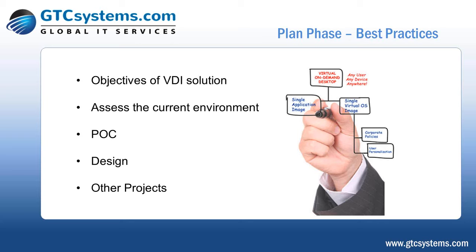You want to assess the current environment, know what applications you're supporting, know what your users are really doing with those desktops. You want to do a POC, definitely do a POC. You can test your peripherals, you can test different applications, right? This is all part of that planning. You want to do a design to make sure that you understand all the components that are going to be necessary to do the deployment.